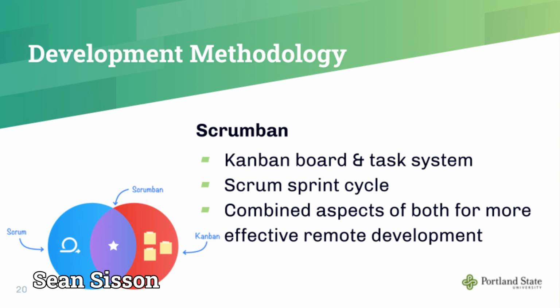The initial development methodology we chose was Scrumban, taking Kanban's board system and combining it with sprints from Scrum. We decided on this approach because we thought traditional Scrum would not work as well given the difficulties and constraints of remote development. So we chose to combine aspects from both that we thought would work best.